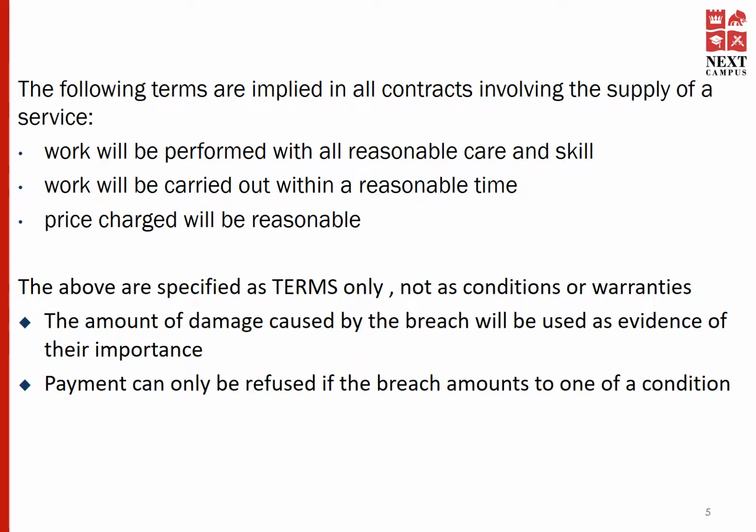The following set of terms are implied in all contracts involving the supply of a service. And they will be: work will be performed with all reasonable care and skill. Work will be carried out within a reasonable time. Price charged will be reasonable. So what we need to understand is that the above are specified as implied terms only, not as conditions or warranties.